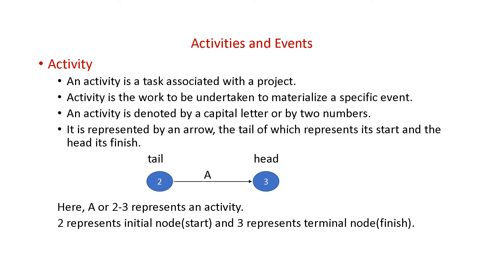Now some important terms are there. Activity. That's the first term. So this activity is a task associated with a project. It is a job associated with a project. Here these are the nodes or the events. Two, three are the nodes or the events and A is the activity. This is the activity which is being performed between the node two and the node three. Between the source and the destination. That is activity is a work to be undertaken to materialize a specific event. Activity is denoted by a capital letter or any two numbers. Any two numbers means you see if this activity can be represented by a or it can be represented by two to three. See this two to three. This way also you can represent an activity. That is what written here two numbers.